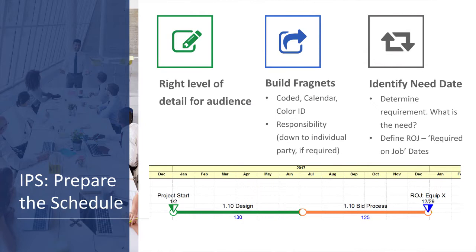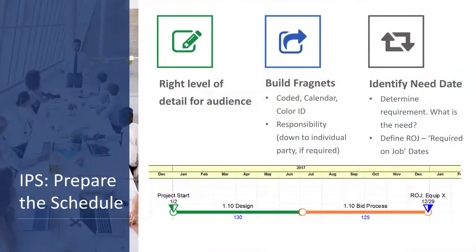So what we found is understanding and taking your Netpoint file to the right level of detail for the audience. If you eventually need a level 5 schedule, but your audience isn't the right audience to bring you there, maybe they can just get you to level 3 or 4, great. Start there, and then you do subgroup meetings afterwards.